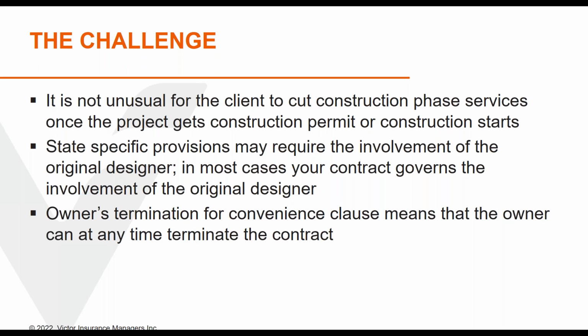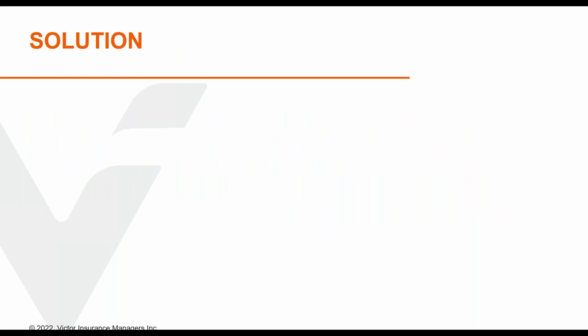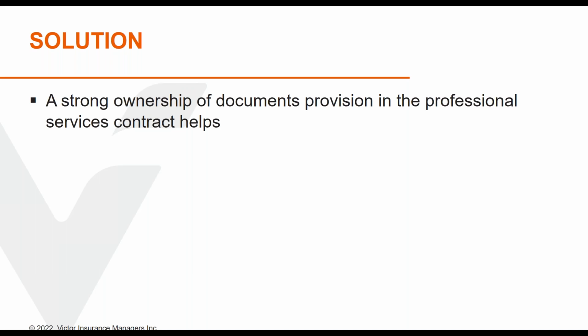And the reality is that the owner has a termination for convenience clause. That's often the case, which means that for whatever reason, if the owner decides to terminate the contract, they can. So the solution is to make sure that you have enough leverage to at least get reasonable terms for your contract amendment. So what helps oftentimes is a strong ownership of documents provision in the professional services contract,